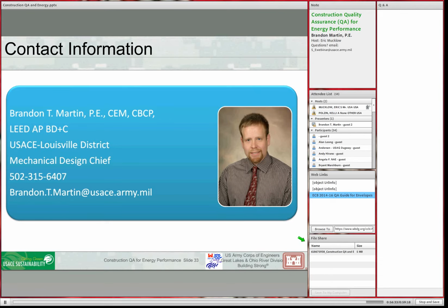Let's see, who determines a third-party commissioning? The person who's going to pay the bill. So for instance, on the Air Force, we just did a project where they wanted us to have a third-party commissioning of a project. So we pursued that, and during the design phase, we had to use P&D funds. During construction, we were using construction funds to fund that.